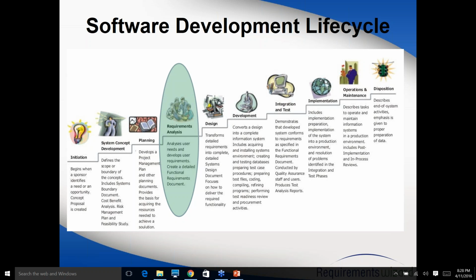Now, instead of how much I had said, like 400, 500,000, it's going to cost maybe twice, because it's a huge complex requirement and we cannot do it in 4 months, and we cannot do it with 6 people. We need a team of 12 people, and that means the cost has gone up, because now we need 6 more people, and also we need some more time to do it.